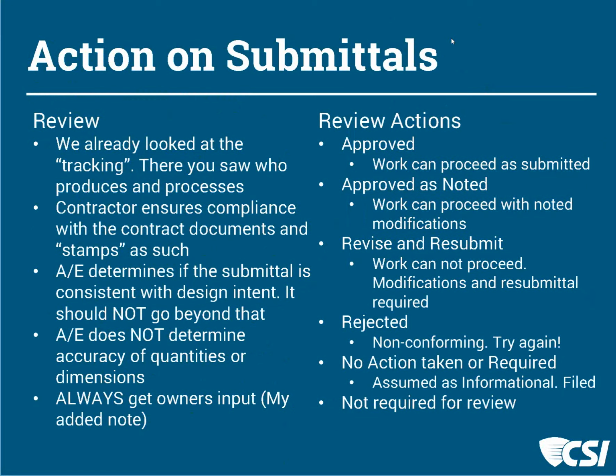So what are the actions that we may take while we're reviewing? And these are words that, again, risk management people have argued about for years. And we're going to take a look at some of these stamps that change this wording. But in essence, we are either approving a submittal and the work can proceed as it's been submitted, or we're approving it as noted. So there may be some modifications that are needed and we're able to note those. They're pretty minor.